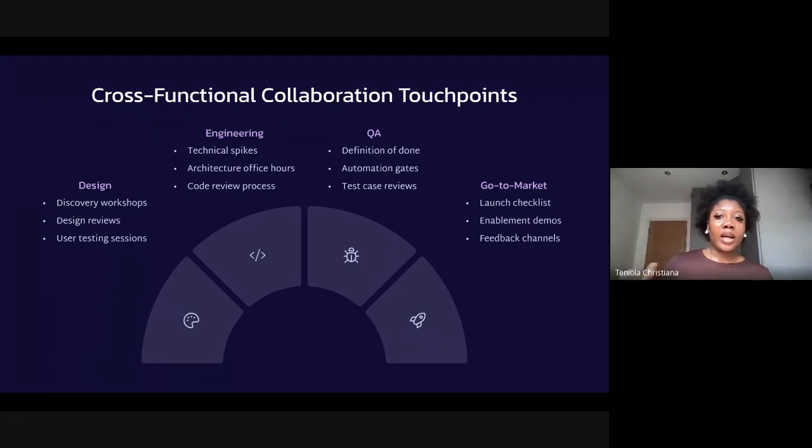It's speaking to QA, understanding the definition of done, understanding how they do their regression testing, reviewing test cases. How do they prepare their test cases? I think people sometimes miss out on QA, but it's a very fundamental part of the process, because if QA don't have a good understanding of what has been built, they don't know how to test it. And there needs to be an understanding of what it means when a specific feature has passed testing and when it's failed testing.